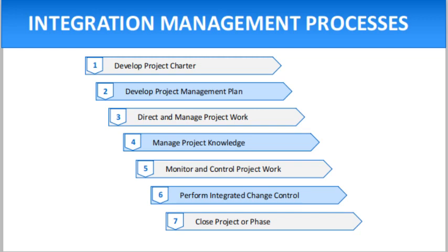Like this, the step is to meet with the stakeholders to set project requirements, deliverables, and objectives, define project scope, create a work breakdown structure, create a project schedule, and conduct a risk assessment. Come up with performance measurement baselines, and develop additional plans for things like scope management, cost management, resource management, etc.